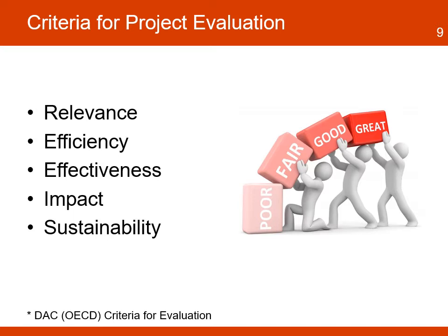Impact. To what extent has the project contributed towards the long-term goals? Have there been any unanticipated positive or negative consequences of the project? And sustainability. Will there be a continued positive impact as a result of the project when it has finished? The organization or donor will identify the type of evaluation that can best help answer those questions. Most evaluations are usually conducted at the end of the project, but need to be planned from the start. As the project makes progress, the data collected will help inform about each one of those factors. The development organization should follow the recommended criteria to ensure a quality evaluation.